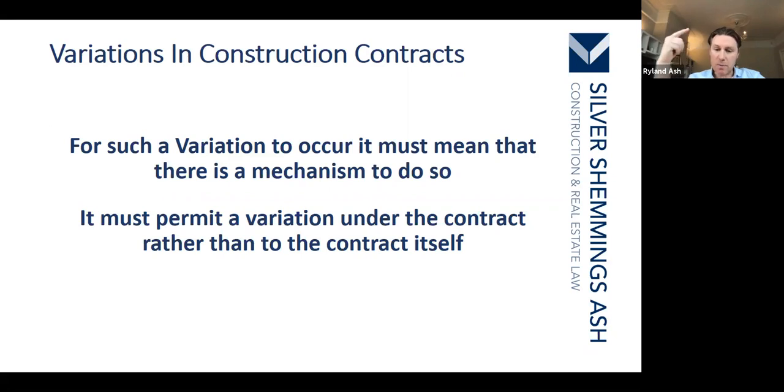Then the Court of Appeal reversed that and said actually the freedom of the parties is effectively absolute and that they can change the agreement at any time. And then the Supreme Court reversed that and said no, if the parties have made a clear agreement saying that this is what is to apply to changes and we can't have any changes verbally, then I'm afraid you'll be bound by that provision.